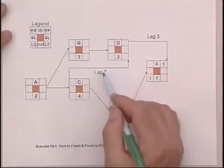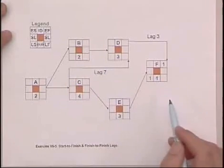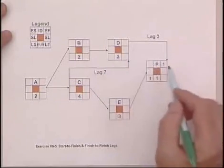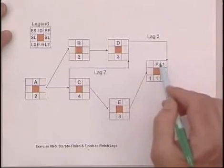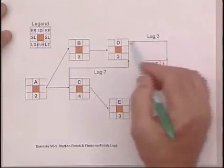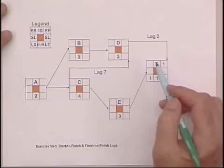D can't finish until seven days after the start of C. And here we have a finish to finish lag. F can't finish until three days after the completion of D.